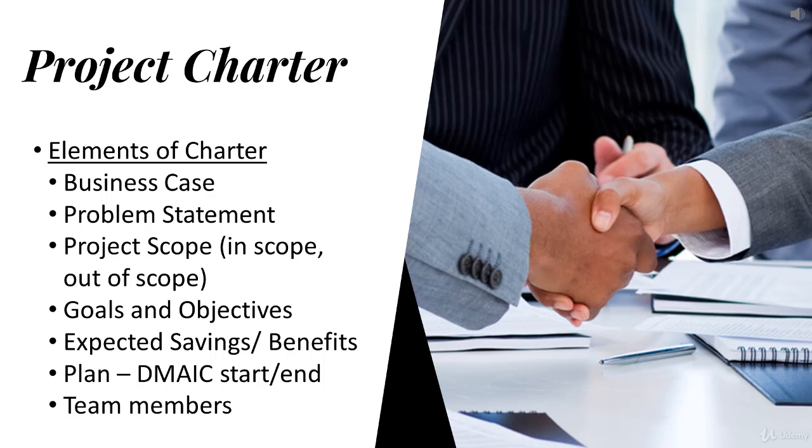So by now you would have had a good business case for why you are doing this project, because by doing this project, this will save this much money for the company, this will increase the customer satisfaction by this much. That is the business case. So in this project charter you list down the business case of doing this particular project. Then you list down the problem statement. What is the problem which you are trying to improve upon?